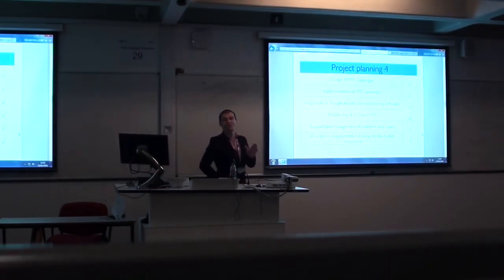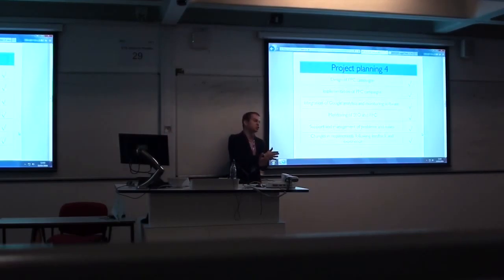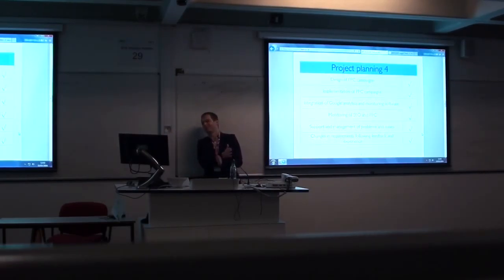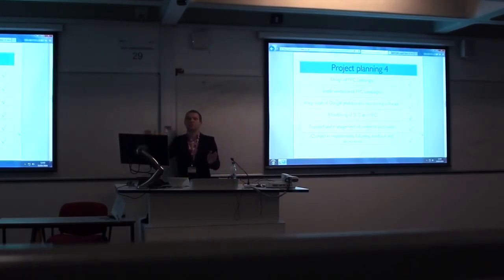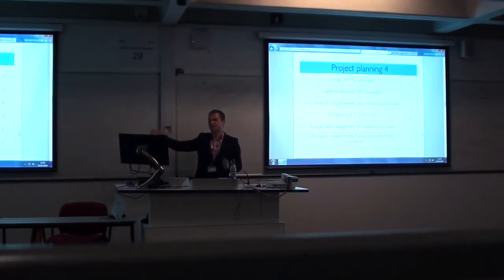If you do not do that, if you do not make sure you've got a sign-off for every stage of the project, either your client or your own partner will get you back to stage A, stage 1, anytime they want. And that's going to have an impact on the finish line and the launch of the product, and again, it's going to have a huge impact on the cost. So once you've agreed on something, boom, move on to the next thing.